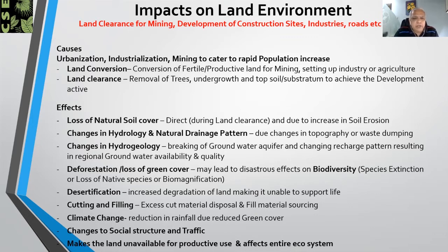Cutting and filling, as we have seen, the excess cut material needs to be properly disposed of, and if the fill material requirement is high, then we need to source this fill material from outside. So again, this requires a lot of planning.